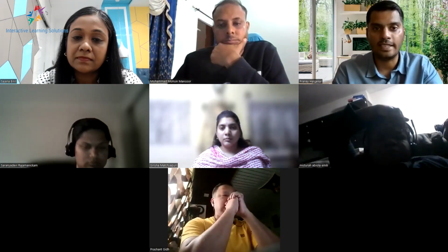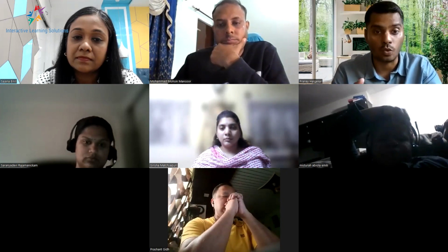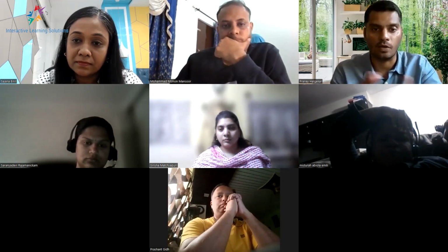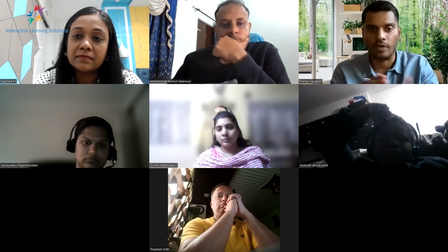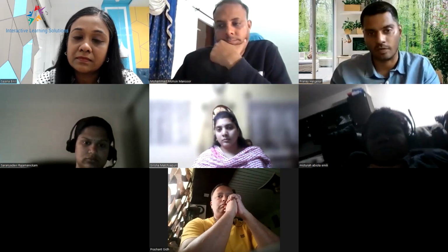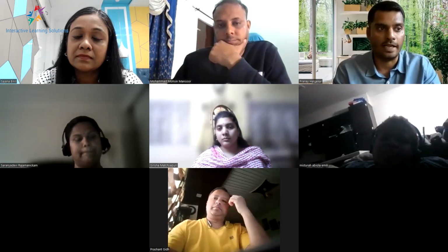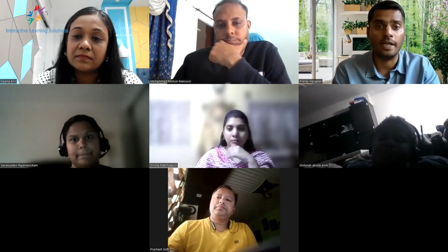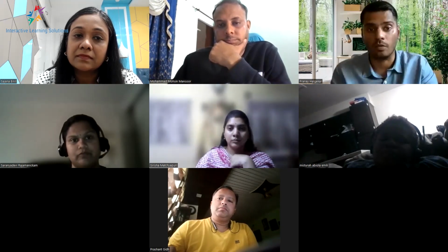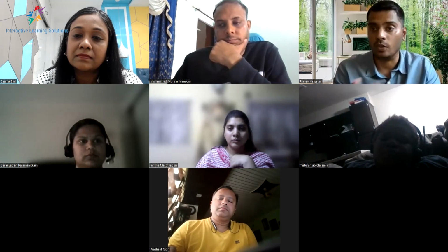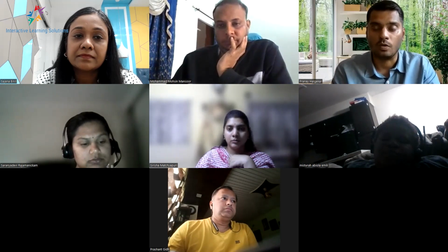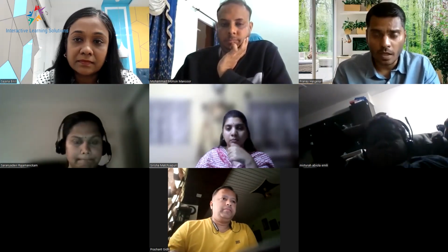Number two, guys, in case there are any spikes or any user stories for which you find there is no estimate, or you think you need more clarification, you can highlight those points. However, details and specifics can always be discussed after the call. In case there are any impediments or any dependencies on other teams without which you cannot start your work, highlight those on the call. And again, you can connect with me or with Mohsin, and we can work on more clarification to bring down those dependencies, right?